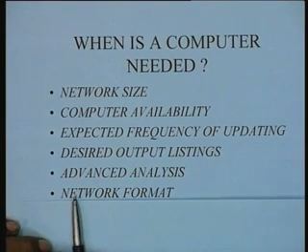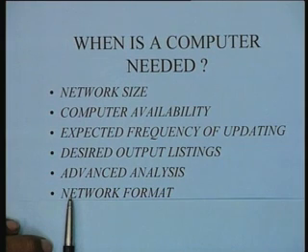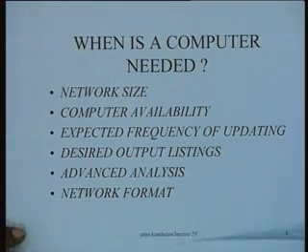By the network format we really mean is the network going to be in the AOA mode or in the AON mode or in the precedence diagramming mode, because different computer packages give you various options in terms of dealing with different kinds of network formats. So these are some factors which really determine whether a computer is really needed or not.